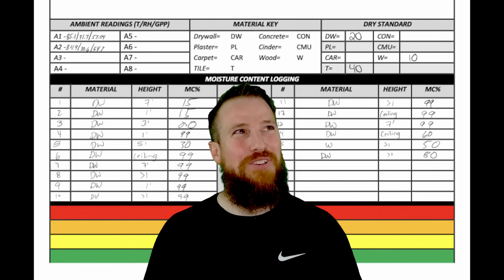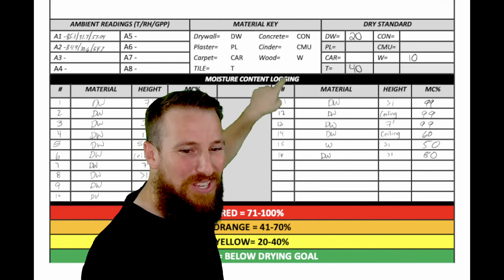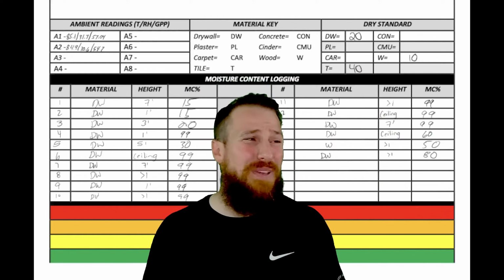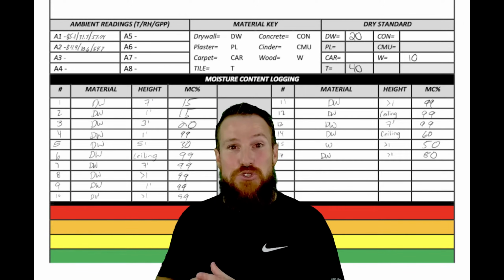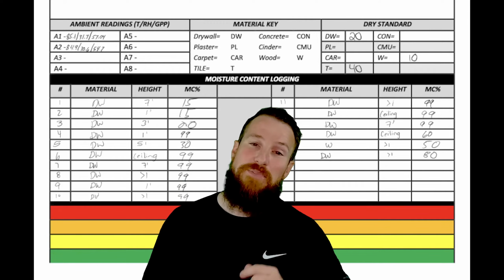Now you may be asking yourself, that's great, Josh, but how do I know if it's right here or here or here or here? Do yourself a favor. There's a million different ways to do it. You could put a little sticker. You could put a piece of tape. You could put a Post-it note. If you really don't care, you can use a carpenter's pencil and write 14 with a circle on the wall, and then that individual, Tony in this case, will know exactly where to collect the moisture concentration reading to go ahead and update this map.